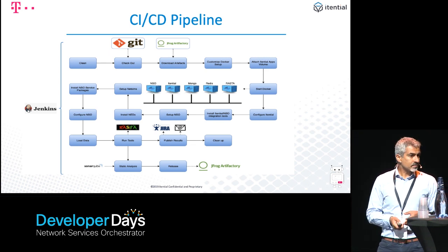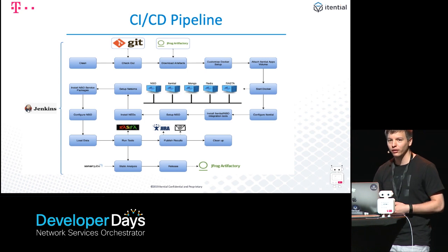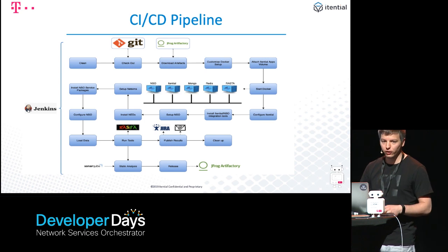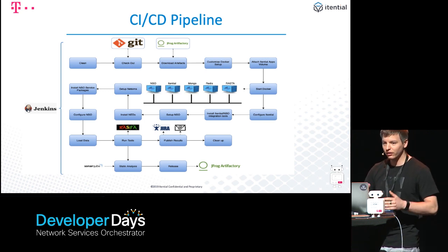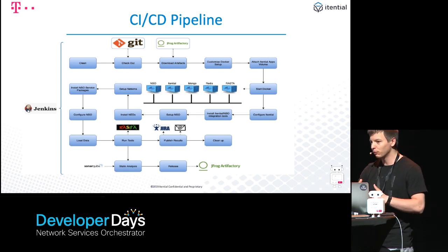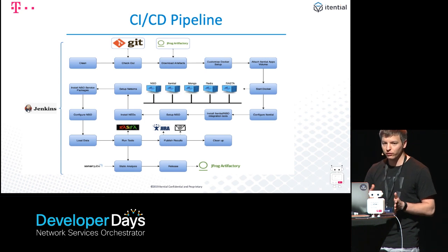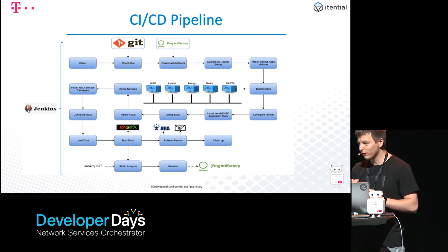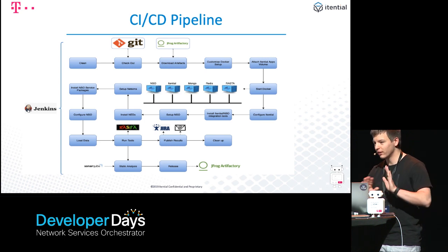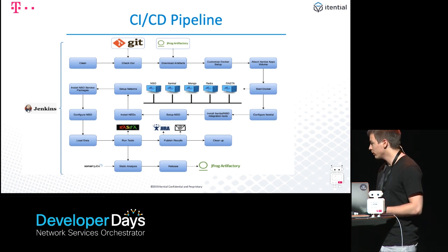Yeah, before you go, that's maybe one already lessons learned. We heard earlier today, plan this from the start. So Anand said this was part of the RFP, this was always planned to do. And then it got kind of reprioritized during the project. And now we have our first use cases running. And now we actually need this to see if any modifications we need to take care of or to profit from all this modularity. We can't test automatically fully yet. So a heads up there: don't reprioritize around CI/CD, get this finished, get this done, and then work from there.